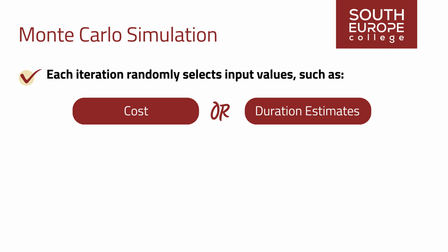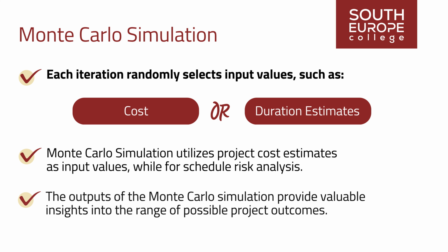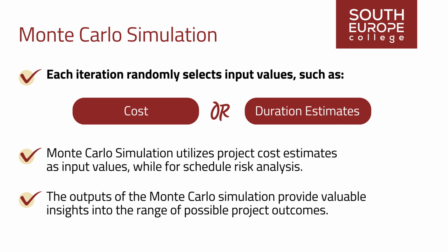at completion. For cost risk analysis, Monte Carlo simulation utilizes project cost estimates as input values, while for schedule risk analysis, it relies on the schedule network diagram and duration estimates. Integrated cost schedule risk analysis combines both inputs to offer a holistic view of project risk. The outputs of the Monte Carlo simulation provide valuable insights into the range of possible project outcomes.